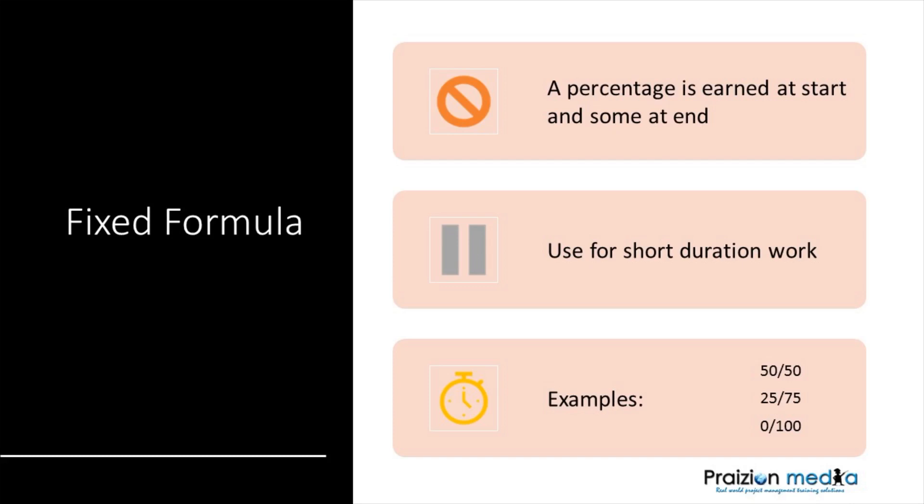Some people get a little bit creative with it, but typically you would see fixed formula used in a 50-50 split. You get 50% when you start the task and the remaining 50% when you end — it's called 50-50. Or we have the 25-75: 25% of the value is received when you start and the remaining 75% when you end. These are typical methods for, as the PMI puts it, small and short duration work.